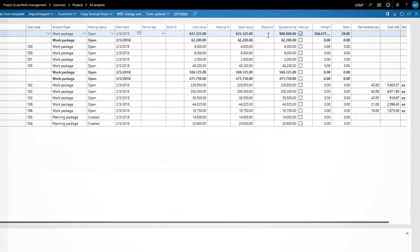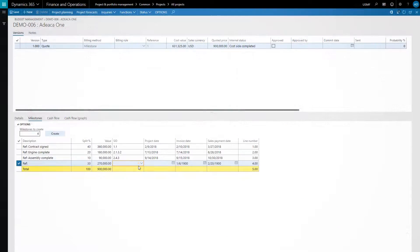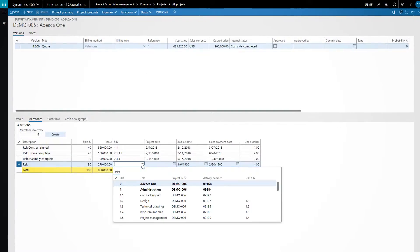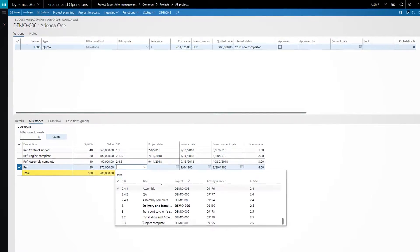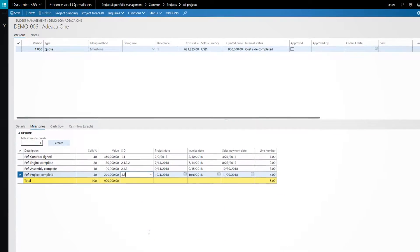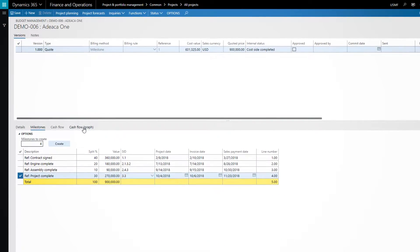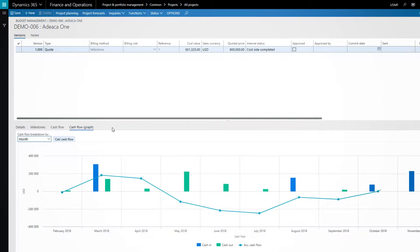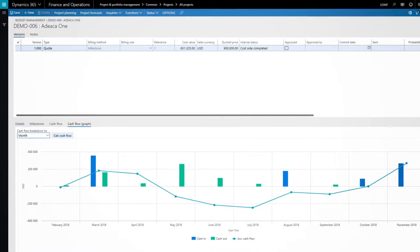As we define the payment plan for the contract, we can link the installments to the schedule, which time-phases our revenue budget and enables us to generate accurate cash flow projections.